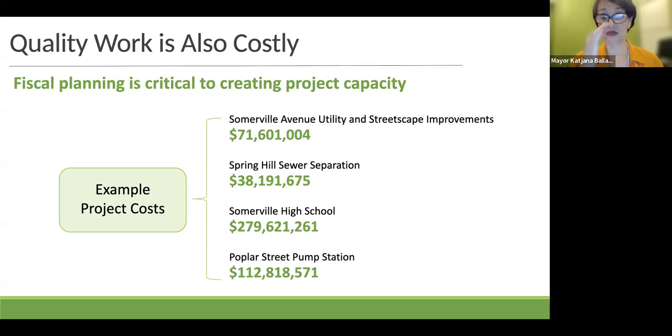And to break it down, a little bit smaller is sidewalk costs. Guess how much a sidewalk costs for 1 mile on one side of the street? $1.5 million. Paving the roadway for 1 mile is also $1.5 million. So accordingly, a full street reconstruction is in the order of $4.5 million per mile. So for 2 sidewalks and for the street. And that just gives you a sampling.